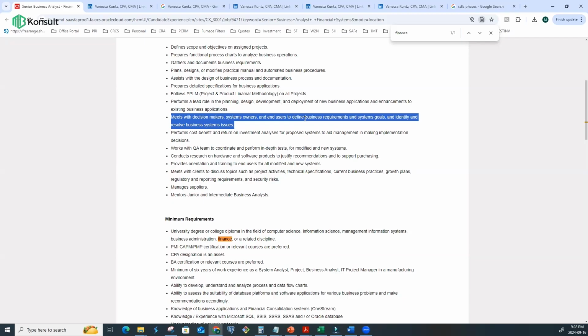I engaged them by their functional areas, and I was able to document their functionality. Once this was done, and I had come up with the business requirement document, I had to take it back to them in a meeting where I was trying to get their buy-in for correctness, for accuracy, and for completeness. Once I was able to do that, I handed over the business requirement document to the technical consultants, whose responsibility was to come up with the technical design.